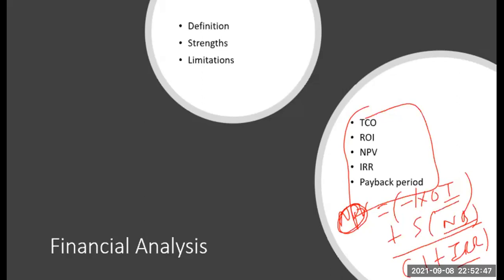In one of the projects that I worked on previously, we had the payments linked to velocity. You commit certain story points and then you deliver certain story points. The ratio of what you commit to what you deliver should be greater than 80%. Then the project is successful, which is not really the right way of measurement. But sometimes contracts are made even before you join, and then it's very difficult to change contracts.